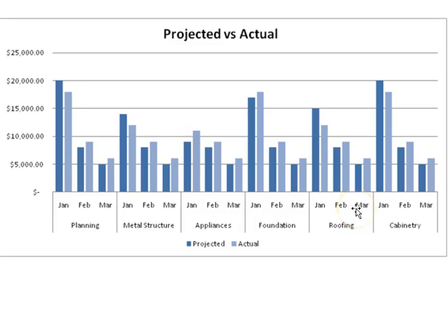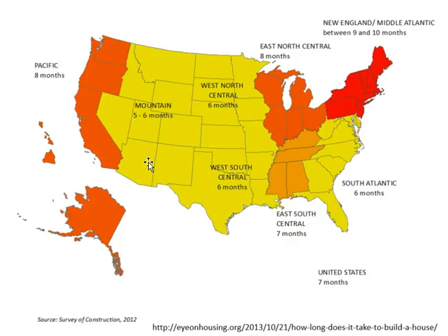So after we have an initial schedule, then we should always go back and keep track of exactly what happened in reality. How long did we expect the task to take, and then how long did it actually take, and then we compare the two. So those lessons learned are of critical importance for construction companies. So that's what this shows here. Obviously not in terms of a Gantt chart with tasks, but it could easily be applied. This logic just the same. Very important.